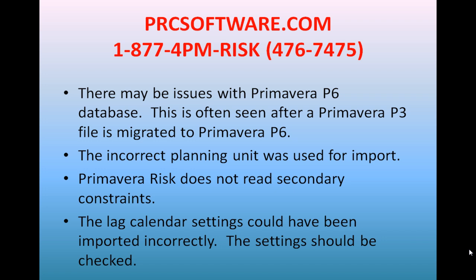The incorrect planning unit was used, where you've got an 8-hour day planning unit, and when you typed in on the import, you did 10-hour days. That could cause all the dates to be off and all the durations to calculate incorrectly. Primavera Risk doesn't handle secondary constraints. It really shouldn't do anything with your import, but it is important to know on the import log that if you have secondary constraints, it's going to remove them.